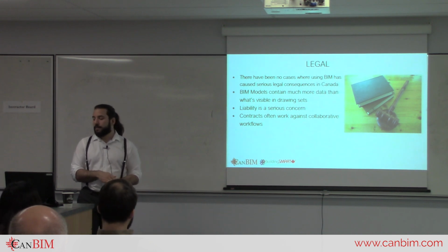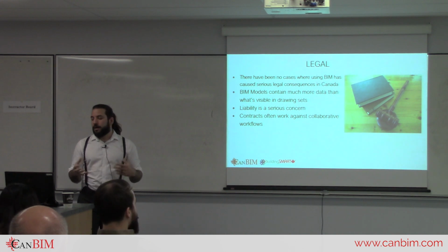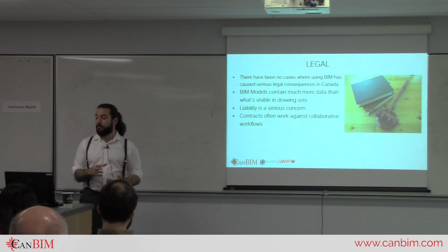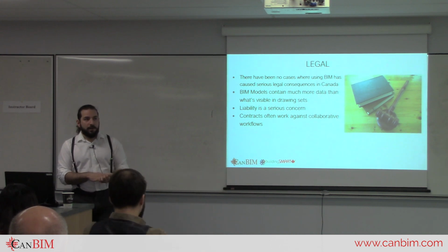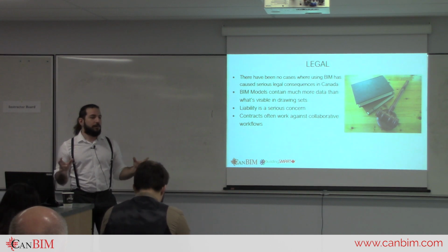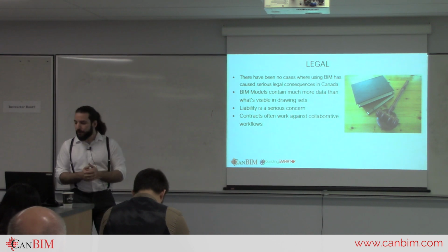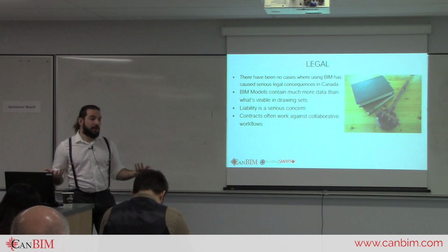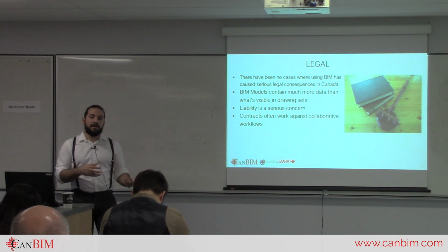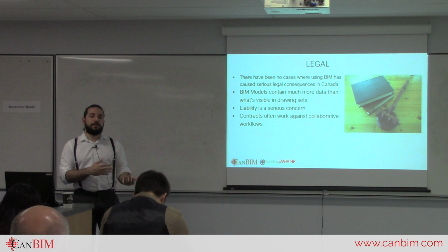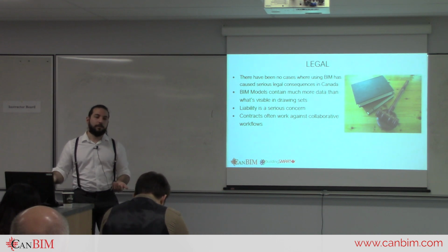But because of the hiring structure, and because design-bid-build is still the most popular method of building things, the different parties simply don't have an interest in what happens to the other when their model quality is not up to scratch, for instance, or maybe something minor that would make things better for another. So an architect doesn't necessarily have to comply with a request from an engineer or from a contractor.